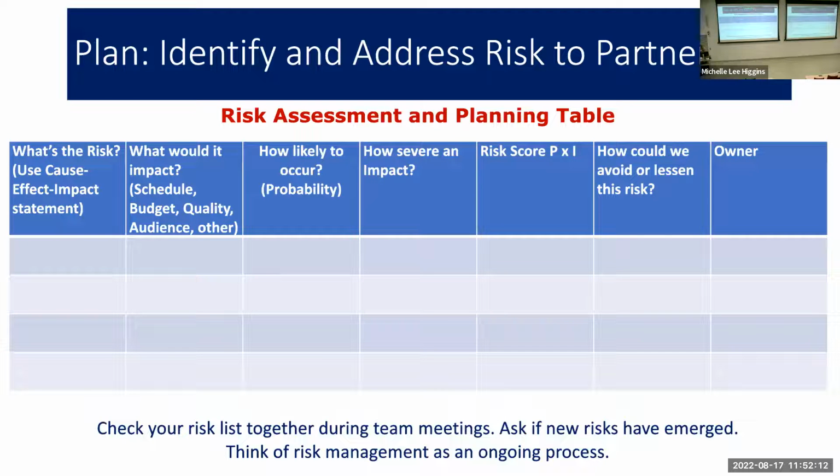Okay, so we have our risk assessment table on page 46. For most teams, I recommend that they actually keep a risk table, and at the bottom, they're monitoring. They have a chart that monitors their most critical risks, and that it's addressed regularly, every other meeting, once a month, whatever is appropriate for them, so that it becomes an agenda item.